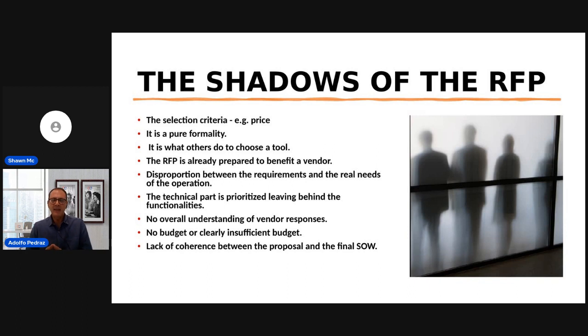So at the end, the tool chosen is very good from the technical point of view, but it hasn't got the functionalities that operations requires. And then operations comes back and says, yeah, it works really well, but look, it doesn't do this, it doesn't do that. So that could be another big problem.